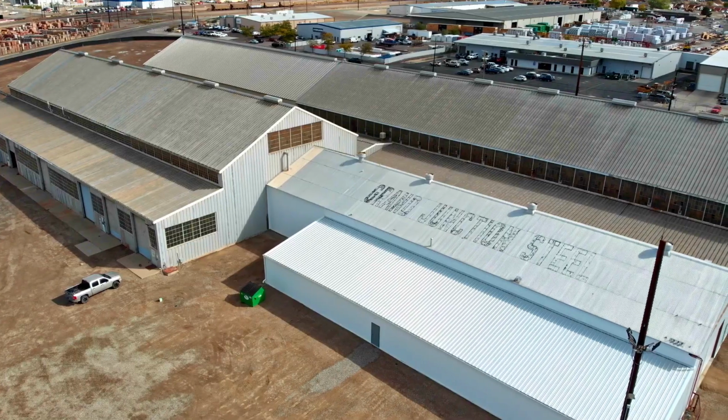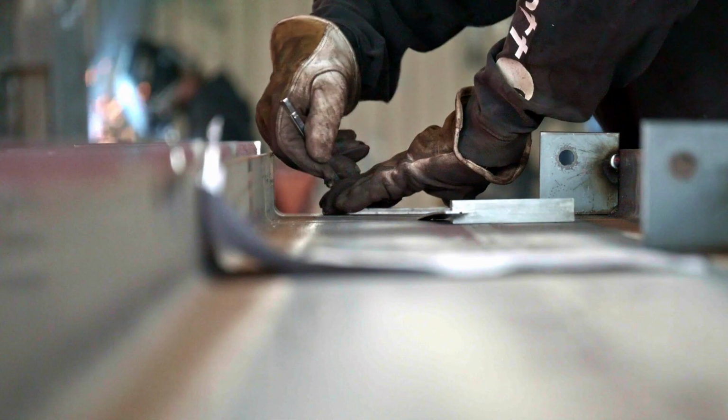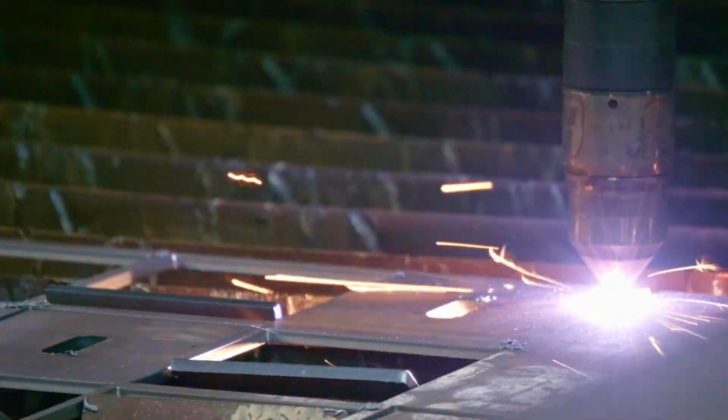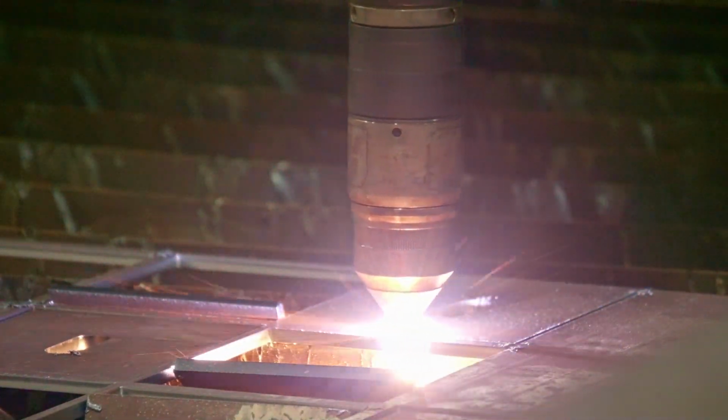As most of you know, Great Western consolidated its manufacturing late last year, and we've been bringing a new facility online here in Grand Junction. Since December, we've been slowly bringing on additional capacity as we get our staff trained and new equipment online. And while we're still experiencing delays with some of the equipment providers, up to 6 months for some of the machines, we've really been doing our best to work around those delays.